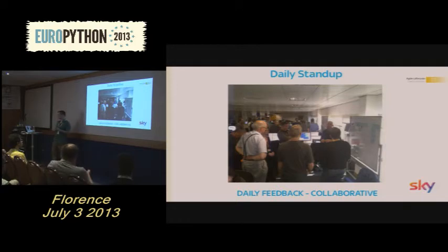Now, every working day starts with a daily stand-up. Now this is an opportunity for every member of the team to answer 3 questions. They'll say what they did yesterday, what they're going to do today, and any impediments that they may have to do their work. Remember that it's a Scrum Master's job to remove these impediments from the team.